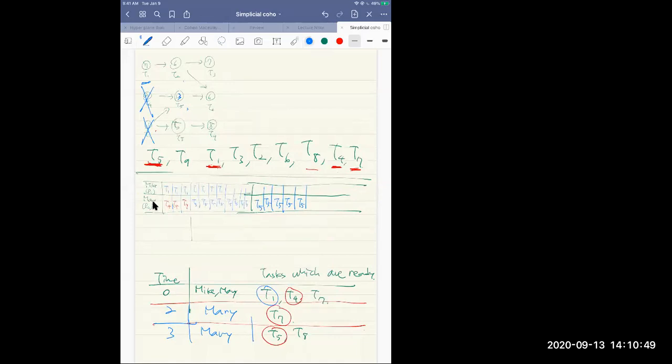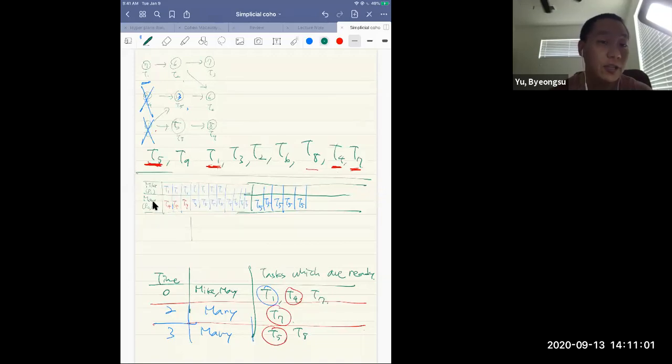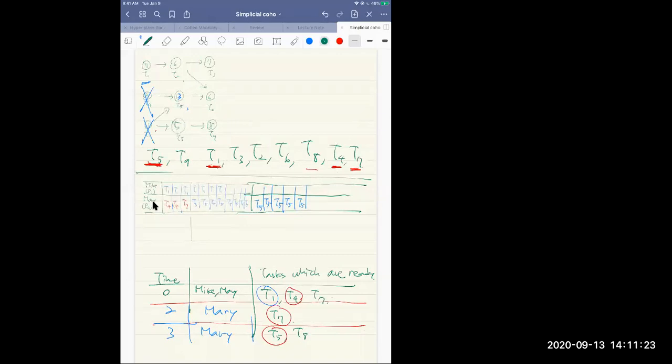So when you have a priority list, you can do them in an order other than that, but if there's an option, you go by the priority list? So if you don't have such a priority list, then you can make it using the critical path scheduling, right? Yeah. But if you have a priority list, then just figure out which tasks are ready at a given point, then use the priority list to prioritize those ready tasks, then assign them to each one, right? That makes sense, thank you.